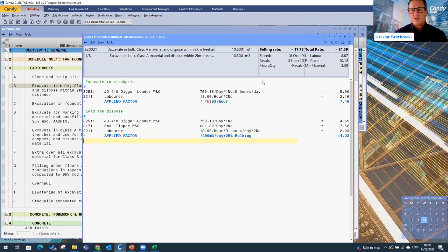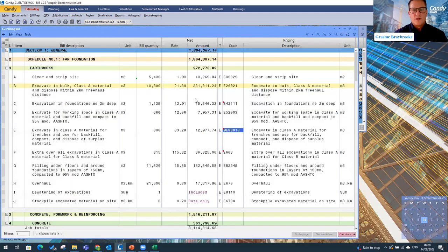All right. And as soon as I make that change and I store the worksheet, you'll see that that then has updated that price accordingly. That has got no effect on my current price for my master, because that is read only. If I do want to go and update the master, I can very much swap the two around and I can import the resource or the updated resource rates onto the current project or the current document.